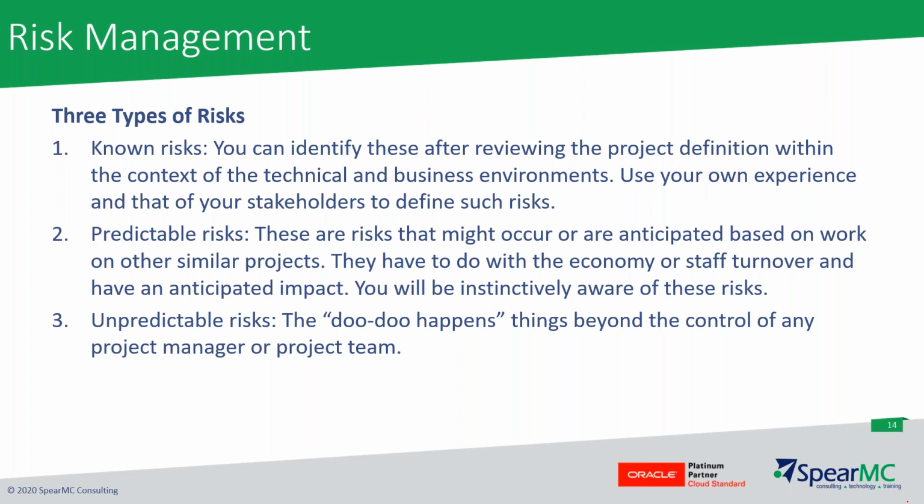project. They could be part of that risk management matrix. There are predictable risks, things like if you're in hurricane season in Florida, or your company could be going through some layoffs, or you have a person that is talking about retiring that's pivotal on the project. It doesn't hurt to put that on here. Same thing for end of life servers and things of that nature, things that are on the peripheral of your projects. So really important to put it on here. Even if you think it's not directly pertinent to your project, important to keep these things tracked.